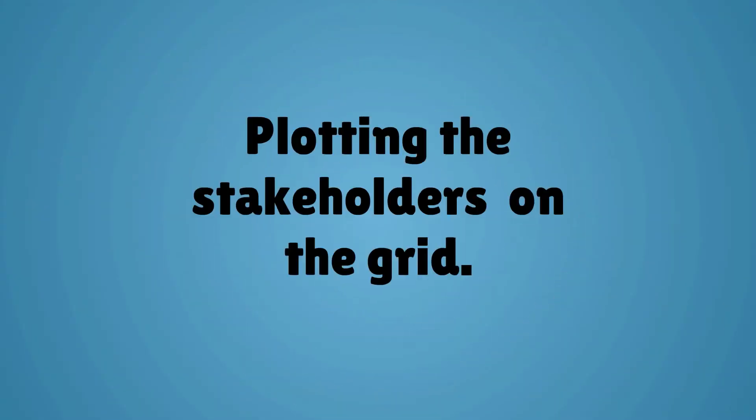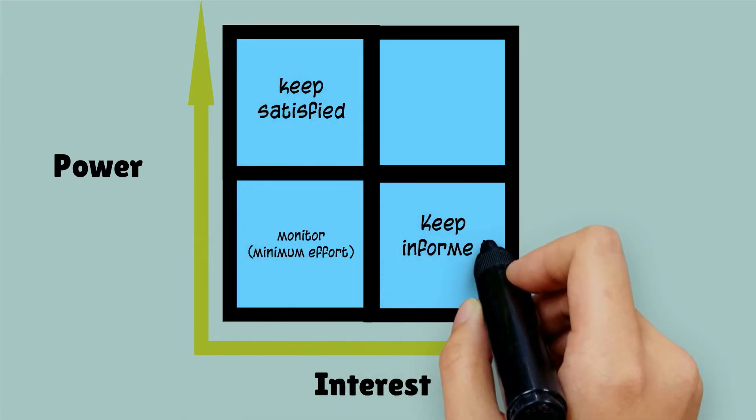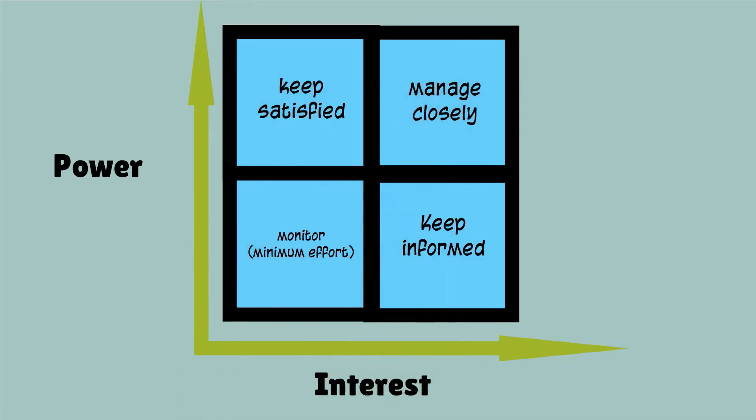In the second stage, when you know who your stakeholders are, you can plot them on the grid. The grid consists of two dimensions: the level of power and the level of interest. Both of these can be either low or high. In this way, you know where to put the stakeholder on the grid and what kind of action is being asked.